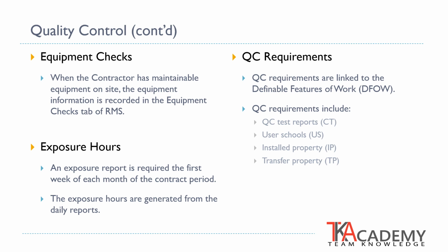Exposure hours are the number of paid duty hours of all prime and subcontractor employees while at the work site. The reporting of exposure hours begins on the day of the Notice to Proceed, or NTP, and is reported on the daily reports. QC requirements is a collective term given to the contract requirements for quality control tests, user schools, installed property, and transferred property.